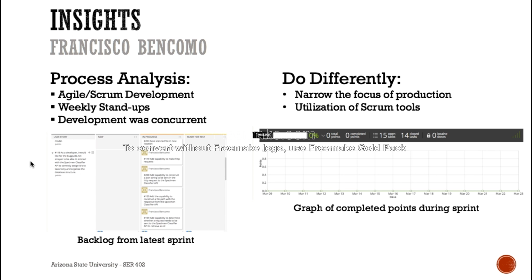We also did weekly stand-ups. Our weekly stand-ups were held through the Slack channel. It was just more of an update than anything to show where everybody was at. We would list what we were working on, if we had any blocks, and what we planned on to continue working on. The development of the project was done concurrently. We were all working on different components of the project at the same time, so there wasn't a lot